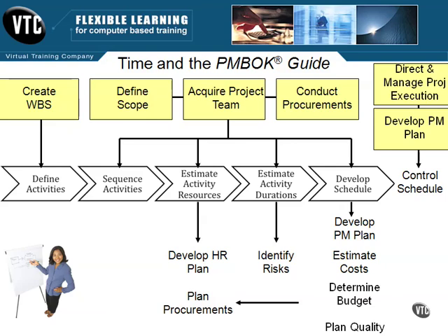As we control and manage the schedule, there will be recommended changes made and reports generated. This will contemplate two processes: report performance and perform integrated change control. Remember that any changes or corrective action requested must first be approved by the Integrated Change Control Board.